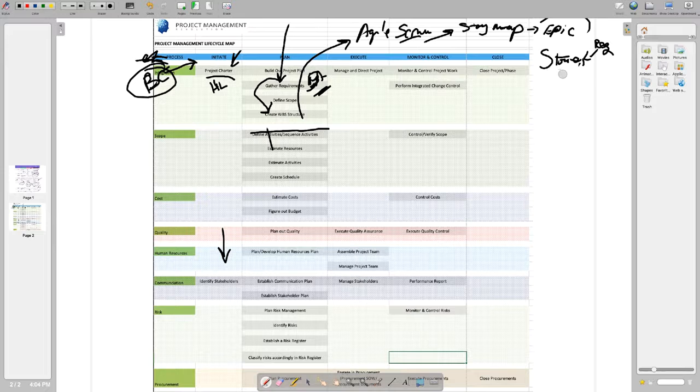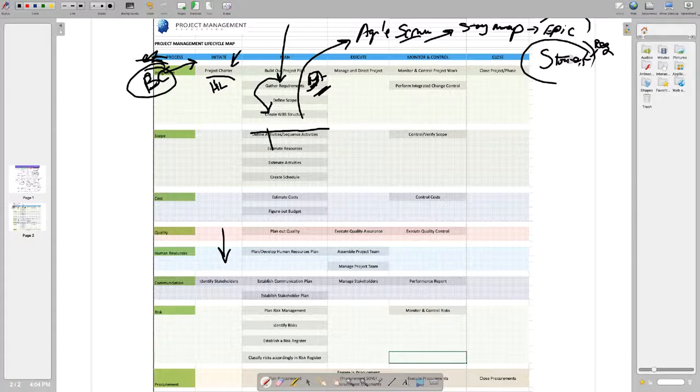once we create the stories, and we've got the epics, we can do that in Jira and set up a project, set up our components, or maybe our releases, depending on how you set up your Jira instance. And then you're going to go and create all the stories.